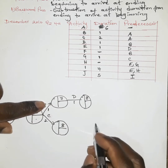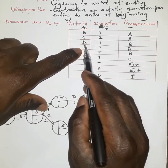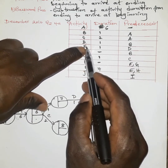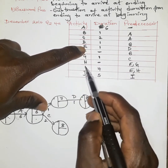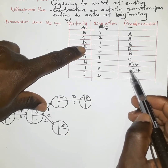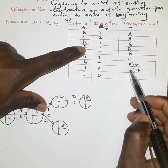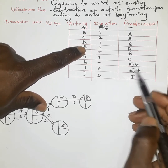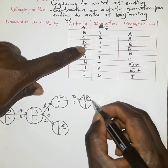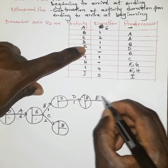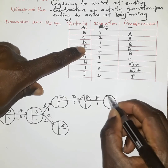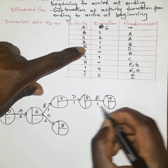After that, we have activity E, which begins as soon as activity D ends. Remember, activity E is also linked with activity I. When we get to this particular junction, we take the activity which takes the longest duration — in forward pass, we pick the activity with the longest duration. Activity E takes a duration of one week and completes at nine — eight plus one.